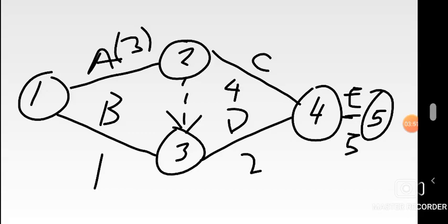We now need to create the critical path. If you remember, the previous video said that part 2 will explain how to create a critical path. One thing you should know is that the critical path is always the longest route. Take this point as gospel truth. The critical path is always the longest route.